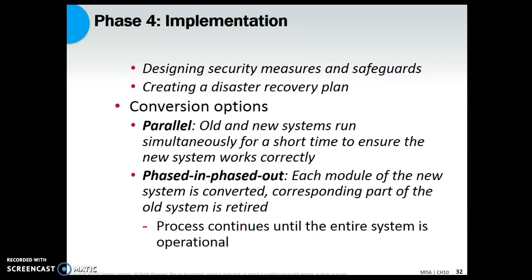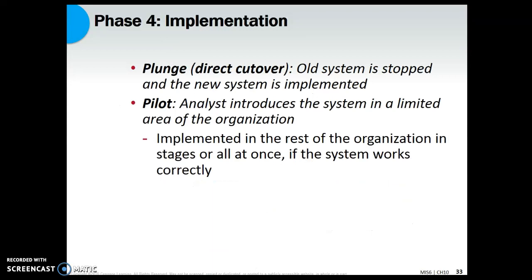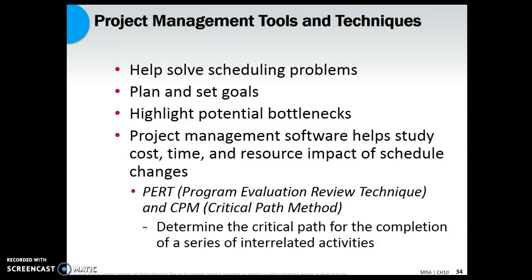And then with the conversion part of the implementation, you may run the systems side by side, which may be the old system and the new system, and that's called a parallel. Or you may do a phased in and phased out. So you may add the new module and slowly phase in and phase out parts of a system. There's a plunge, which is a direct cutover, and we use that occasionally. There's a pilot, which means that you get to test something out before you use it.